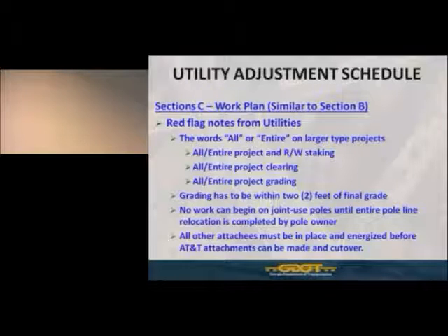Or that all work on joint use poles, the poles must be completed before any work can begin. That type of information. Again, if we have a small project with a handful of poles, that may not be an issue. But if we have a project with a large number of poles, the department will probably expect that you could perform some work in phases to help accommodate the schedule of the DOT project.